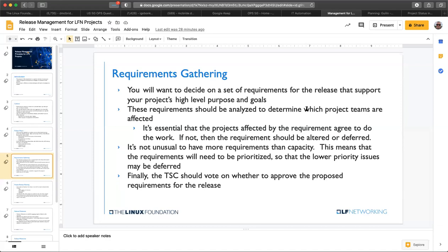Yeah, that's a frequent criticism of this process that I'm describing. My experience is that agile efforts work well at the sub-project level, but it's very difficult, and I've never seen it actually happen at the project level for a project of any size. The other thing you run into is that with a large project where you have maybe hundreds of developers, not everyone is going to want to work in Agile. So you end up having some projects that want to do Agile, other projects that don't.